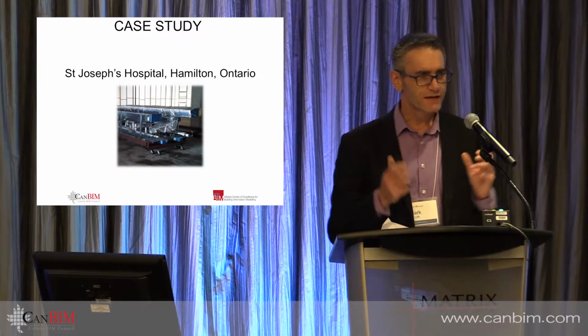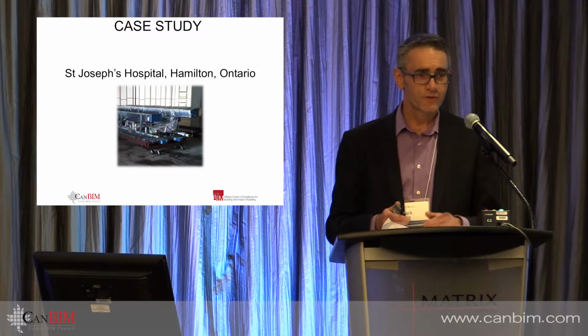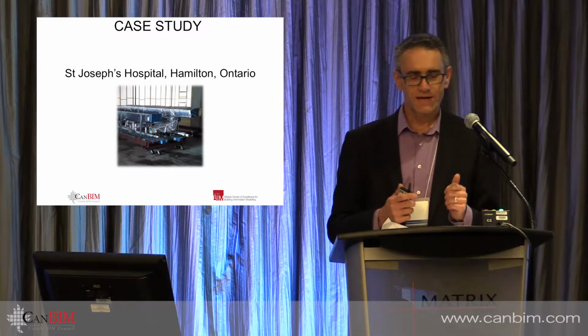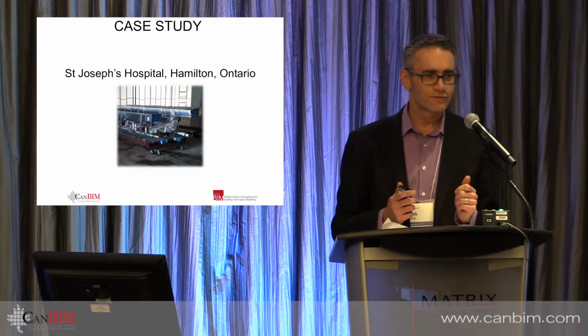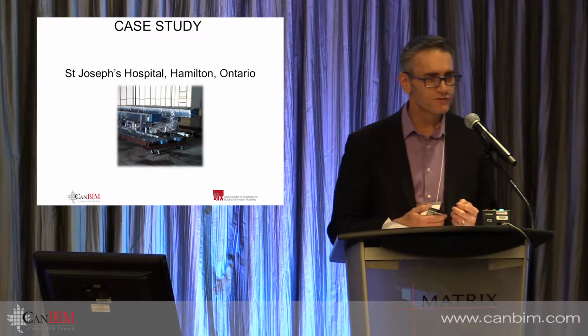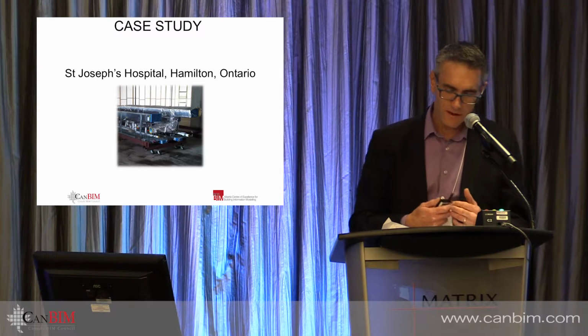In this one, the mechanical electrical guys said, we're going to build the racks, we're going to go. And we said, great, go at it. And then we realized afterwards that somehow in that equation, the drywall had to go on and get in there, and that was starting to block ductwork coming off to the side. So lessons learned, making sure we understand everything around it.